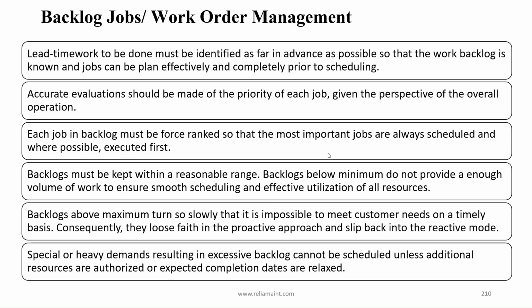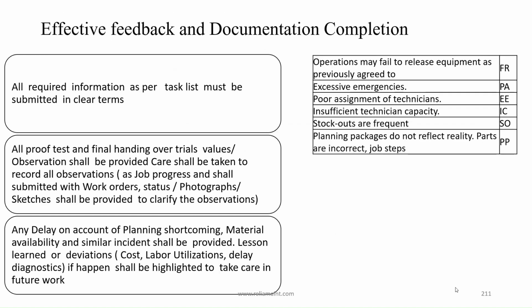Backlogs below minimum do not provide enough volume of work to ensure smooth scheduling and effective utilization of all resources. Backlogs above maximum turn so slowly that it is impossible to meet customer needs on a timely basis. Consequently, they lose faith in the proactive approach and slip back into the reactive mode. Special or heavy demands resulting in excessive backlog cannot be scheduled unless additional resources are authorized or expected completion dates are relaxed. Effective feedback and documentation.